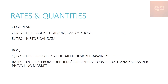Now, how are rates and quantities included in the cost plan? Since you will not be having much details, usually area is taken up, or a lump sum amount is taken, or some assumptions are made. For example, from the master plan you will get the area of a particular building or room, and you will give that area as the quantity for the different elements — civil, structural, interior, and MEP items. For some items like a generator or STP mentioned in the reports, you can put a lump sum quantity, and some assumptions can be made based on historical data.